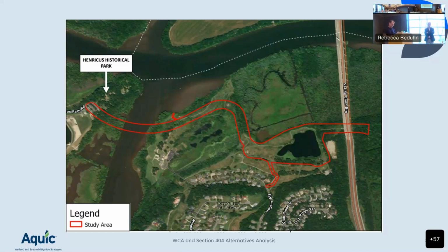So the proposed project will permanently impact 1.27 acres of wetland, half an acre of riverbed, and it'll convert about 6/10 of an acre of forested wetlands to shrub, and then just about 1/10 from forested to emergent wetlands. So it looks like they're going to have to manage some of the vegetation in there when they get the new road constructed. So go ahead, Dave.